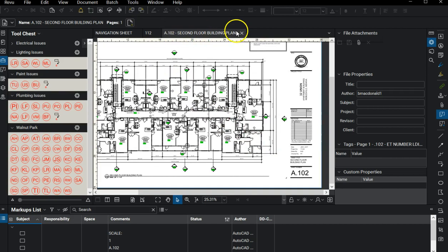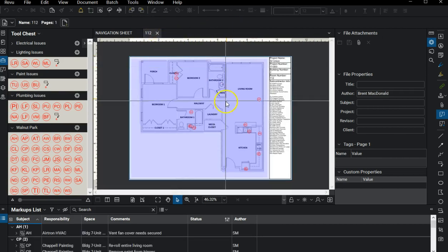Whereas this process of creating each unit as its own sheet allows you to print off a whole list of units at any given time, and be able to walk around and tape them to the unit, rather than having to print off each one of those sheets and maybe hand them to the contractor, who, if you give them one copy, would likely lose it after the first day or even after the first couple of hours.